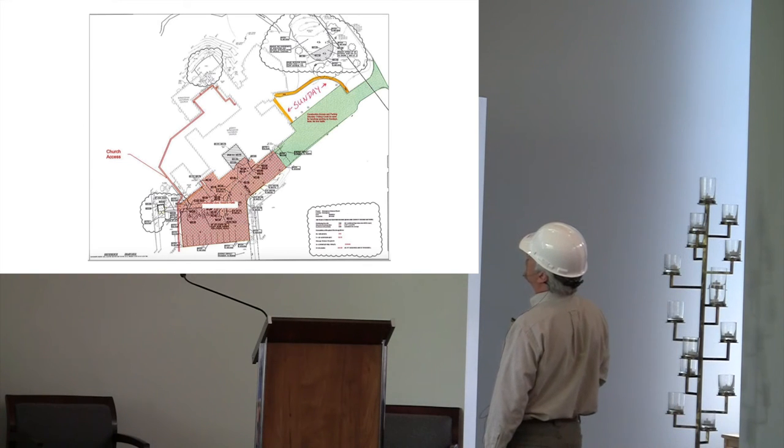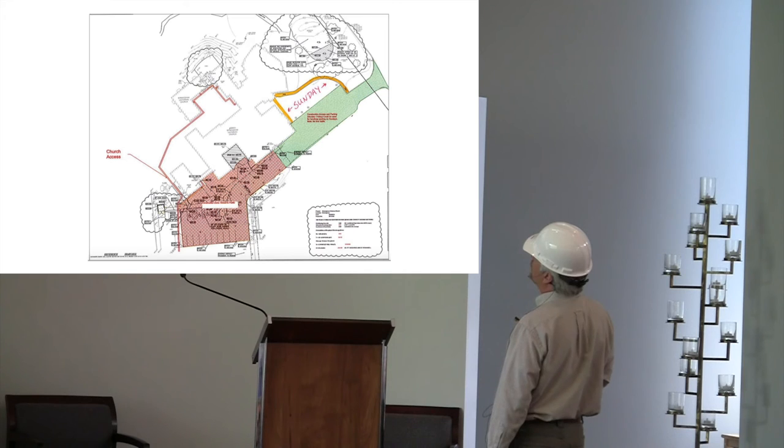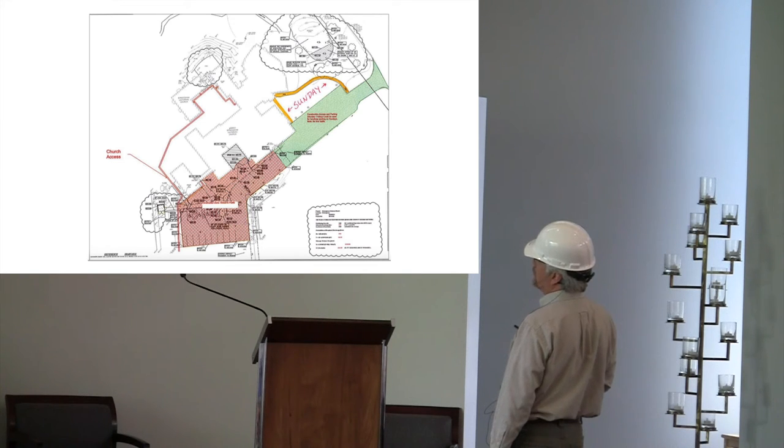Let's see. Where are we? Here's the front door, okay? What the construction folks are going to start to do is stage their equipment, materials, and the dumpsters. Dick mentioned we'll probably have a whole army of dumpsters out here to sort the material. So this is the first two rows of parking next to the building, right? Our new beautiful dumpster enclosure is going to be there.